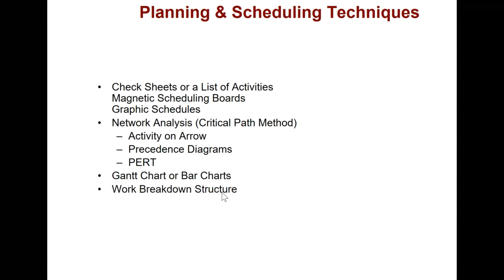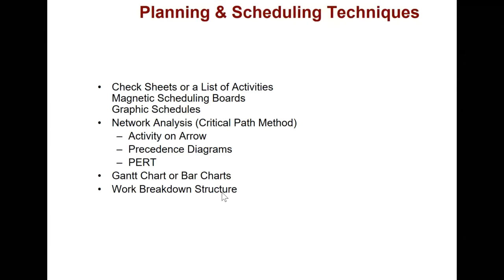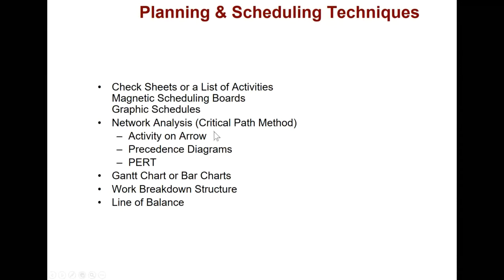We also use Work Breakdown Structure to first identify what the key tasks are that must be accomplished, and then draw a precedence relationship between key tasks to understand the logic. The Critical Path Method is quite commonly used in building construction.